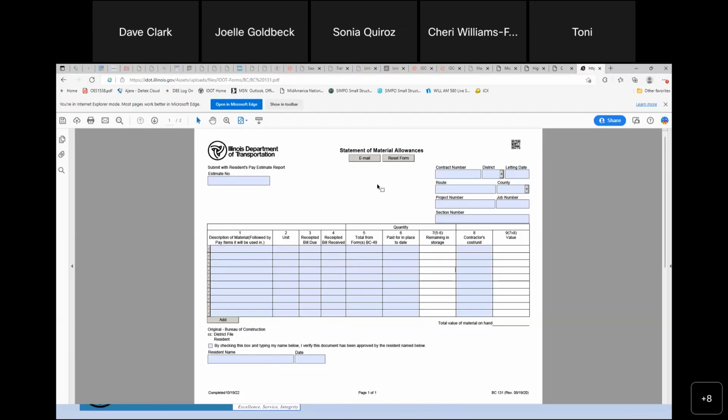Well, that guardrail is not going to go in until the very end of the year. They start the project maybe in April, and the guardrail doesn't go in until now, October. And when you got your price from your guardrail supplier, they said this price is good for 90 days. Well, now what are you going to do when the price goes up? And everybody knows what's been happening in the last year or two with prices.